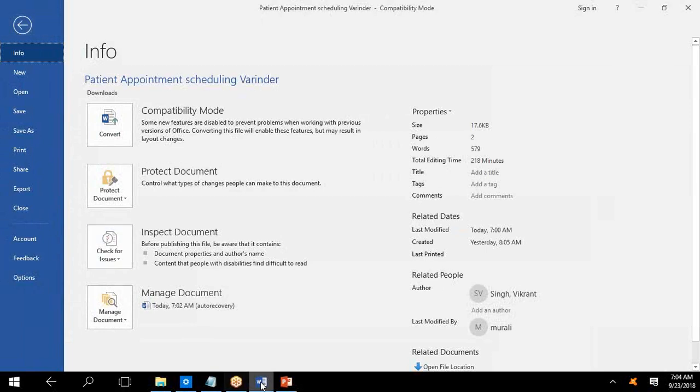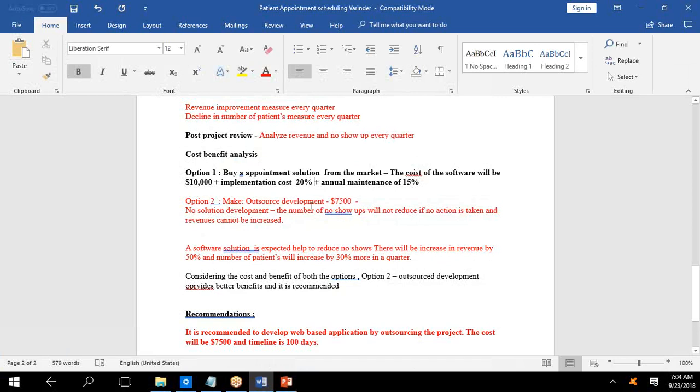And in budget, do we need to write in detail, like when it says total budget? I just wrote it here. It goes in assumptions. I told you right. What they will do normally is, when you propose the budget, I told you this is high level, for somebody to approve. Once they have approved, they will ask you to give a detailed budget calculation. Then you can provide details.